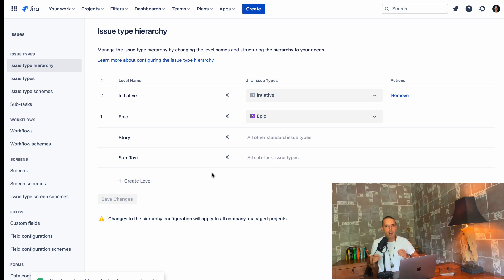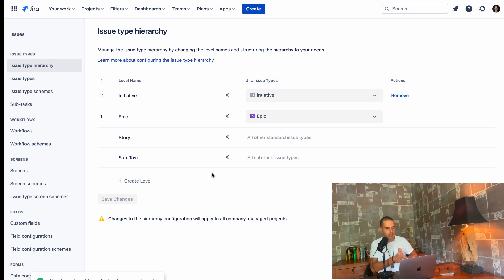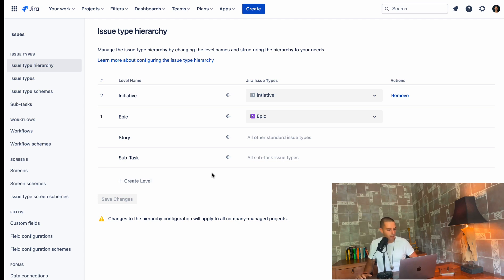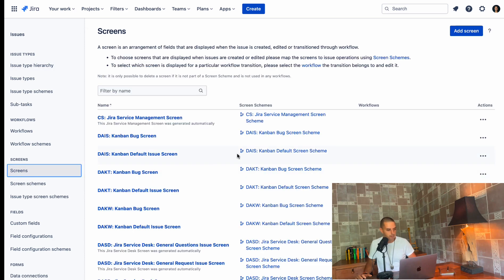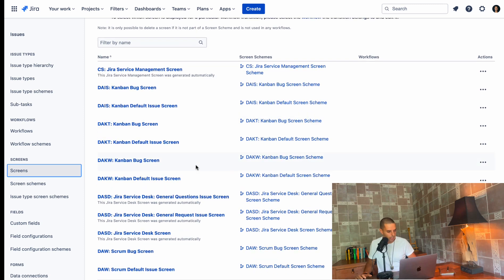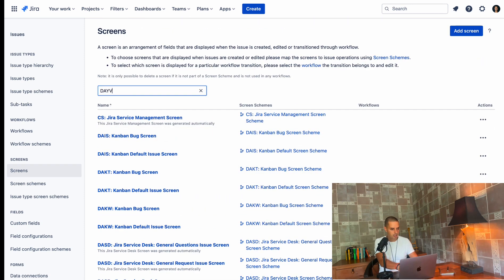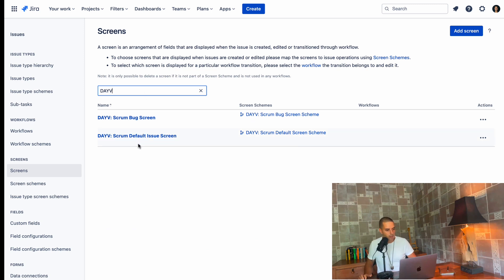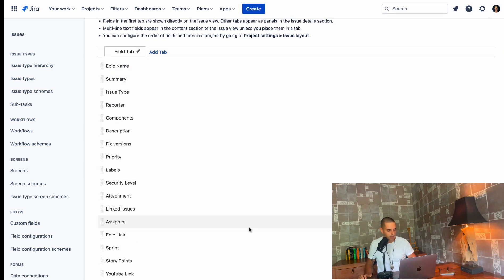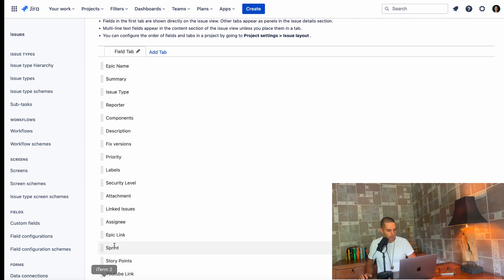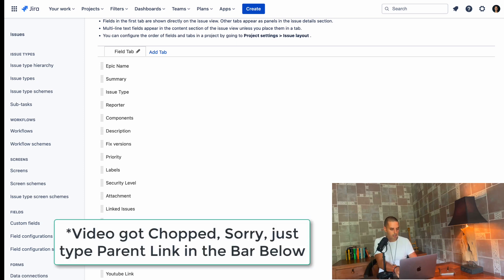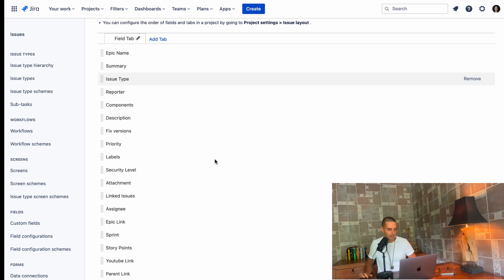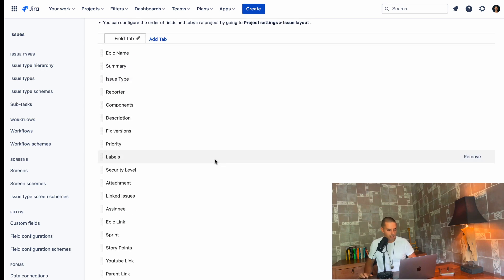So now the last step, how do we associate our epics to initiatives? For that, we need a special field available. The field is called parent link. So we need to make sure that parent link is available. For that, we can go to screens. We need to find our defined agile videos again. So we have box screen and default screen. Let's go and configure the default screen. Here we go. We have to add a parent link. And that is it. Parent link.